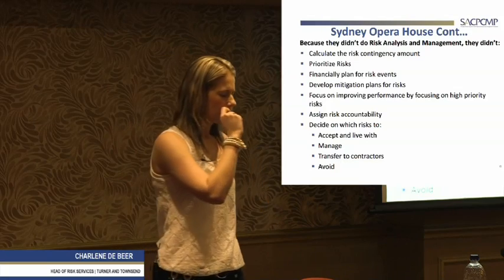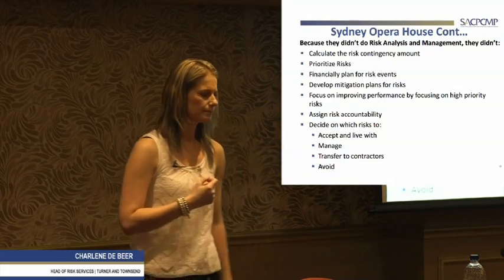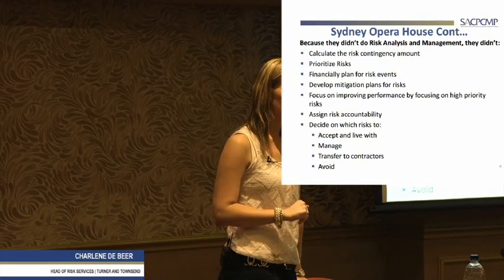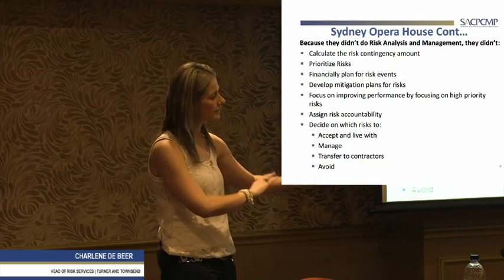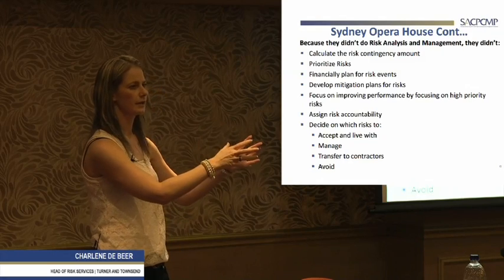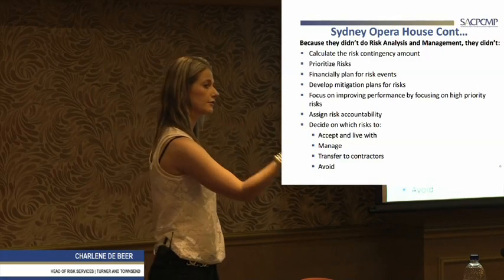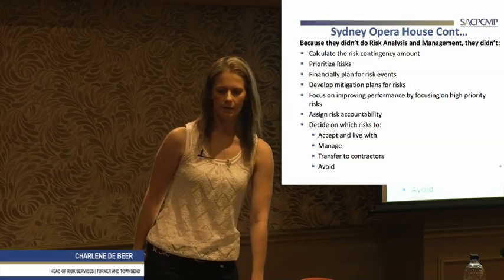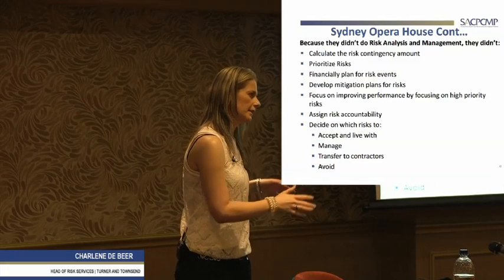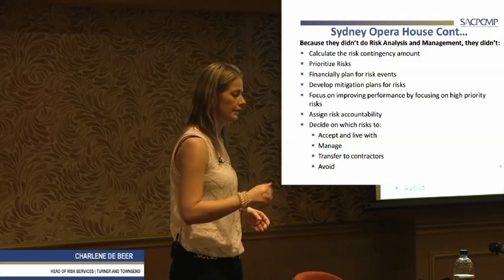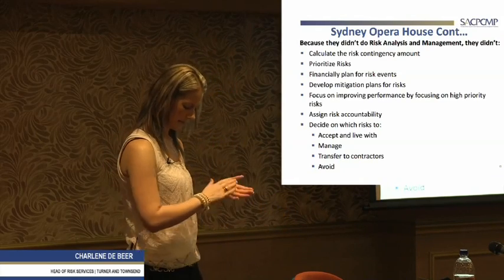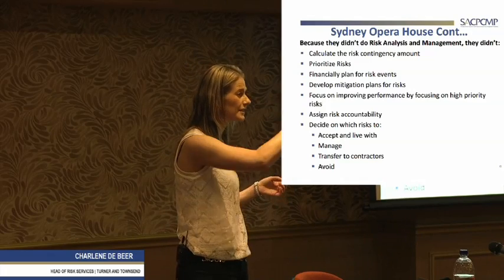So to assign accountability for the risks, people always say it's the PD that needs to be the risk owner, which is 100% right, in a sense that it is his project, it is his deliverable, and ultimately if it doesn't happen, he'll be held accountable, unless he holds somebody else in turn accountable. So you'll have some people who say, well, the risk owner should just be the PD, and I'll say, well, for the PD to mitigate, let's say if it's even only 10 risks, it's quite a heavy job. But then I would assign mitigation owners, specific people.